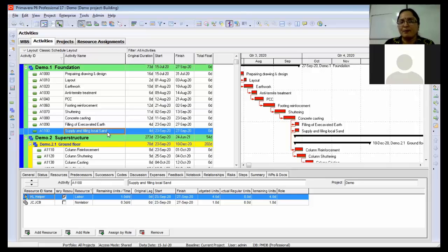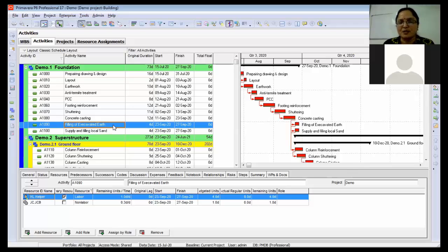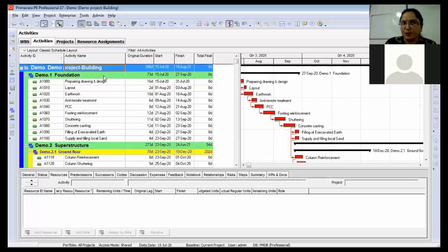It is depending upon what type of schedule you are preparing, whether you are a client or a contractor. So we have to develop different types of schedules for different types of people. If you are the person who has to carry out this project, you should know the exact cost, how much it is going to cost you, so that based on that only you can charge your money, you can quote the tender. So based on that, the best approach is the bottom up estimation.